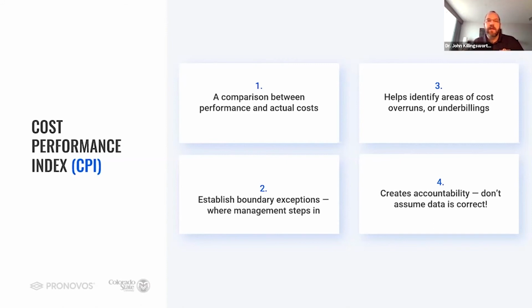When we find those exceptions, that's a great time to sit down with that project manager and say, okay, where's this cost overrun happening and why? And right, is that data accurate? Right, is the invoice from the vendor accurate, the right dollar amount, or what's happening there? Is there some front end loading on their behalf that we need to account for here and to know about? So all of those things are going to need to be considered, obviously.